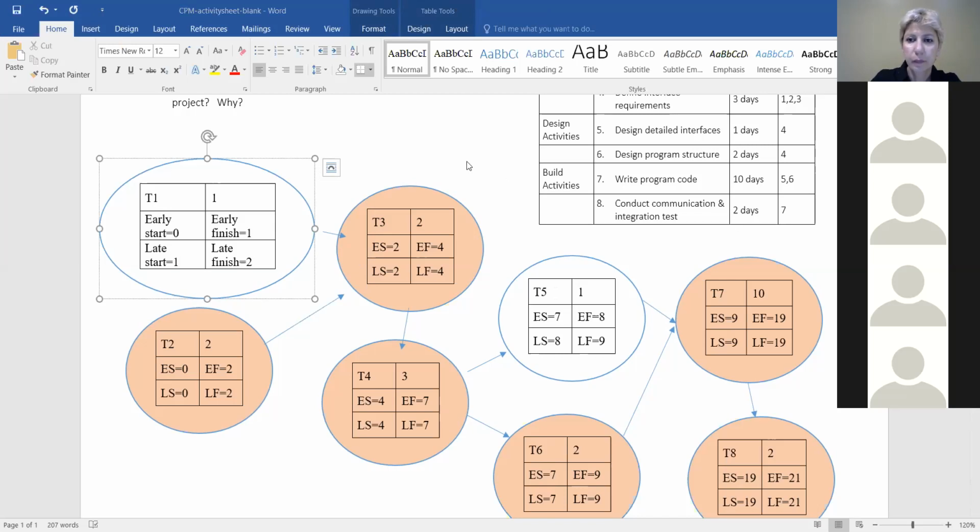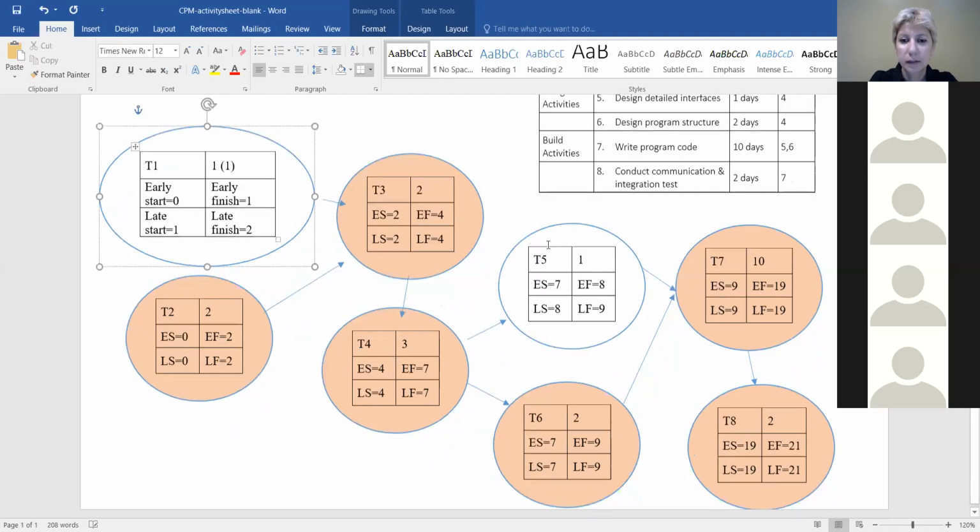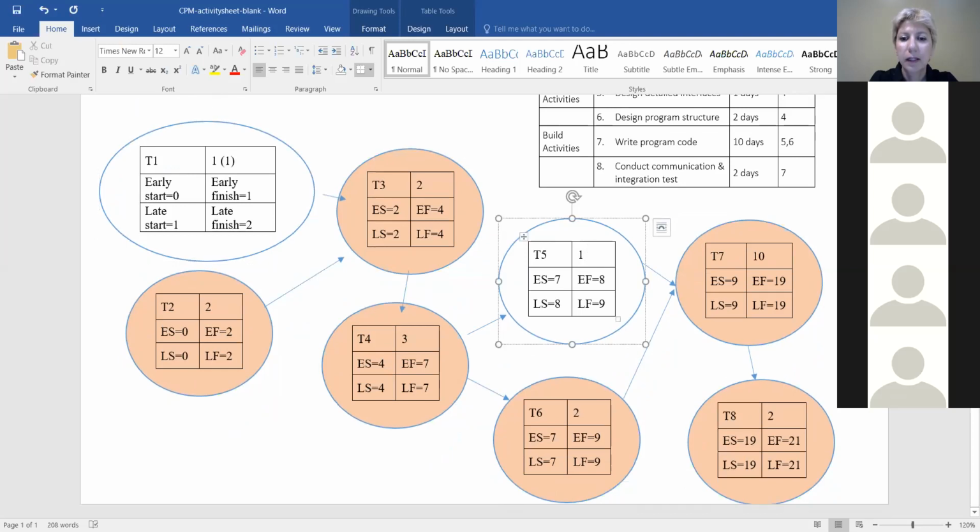That's okay. So Austin, I want you to unmute yourself, show us the slack for non-critical activity. How much slack do we have? Here would be, exactly, 1 day. And then the only other one we have would be this one, which would also be a day. Exactly, perfect. Thank you, Austin. And Jake, your theory was correct. We look at the difference between the two.